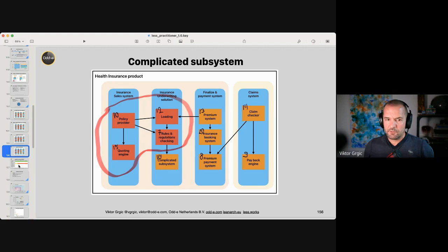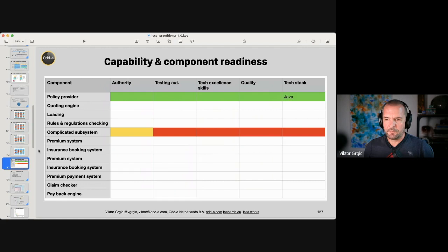So sometimes it's actually useful, and it didn't happen often, only once actually I did something like this, is to assess components and create this kind of assessment. Per component we have a kind of implicit scale here, with the coloring. So green means it's pretty good. This component can be easily shared by anybody, the people have knowledge about it, and the component itself is good, etc. You can fill out here all kinds of information about why it is good.